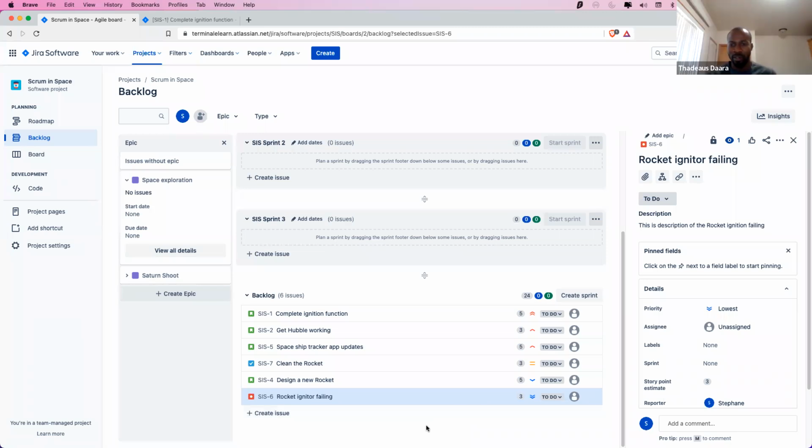Okay. So assuming we have our product backlog prioritization done, in the sprint planning, which is tomorrow, let's say our first day of the sprint is tomorrow, the product owner is going to say, okay, I already have a product backlog prioritized. So I know if you need to pick one story, you start by picking up this one. If you have capacity to pick 2 stories, you pick this one and that one. If you have capacity to pick 3 stories, you pick 1, 2, and 3 in this order, not 1 and then 6. It's in order of priority.